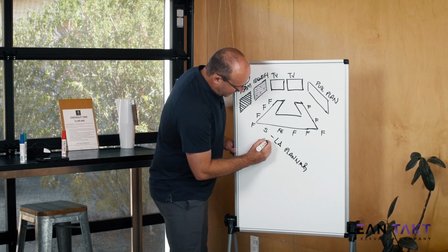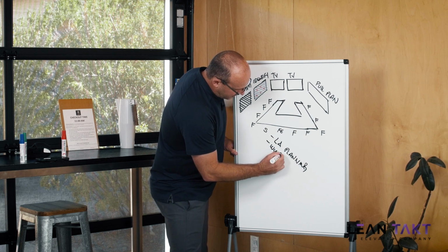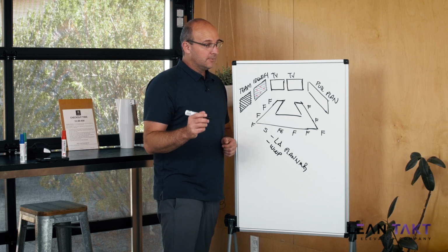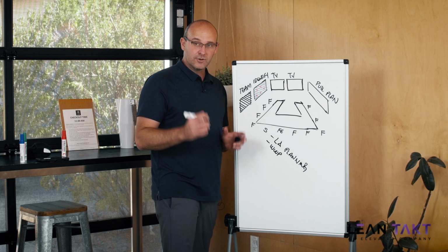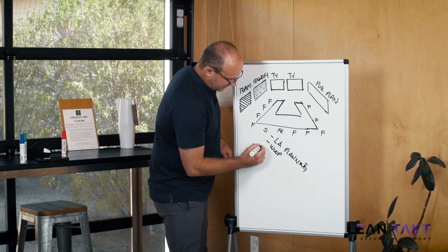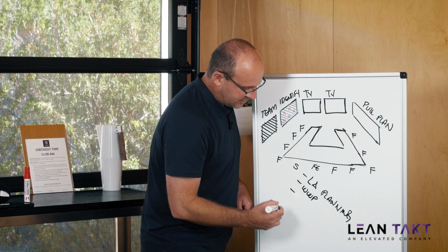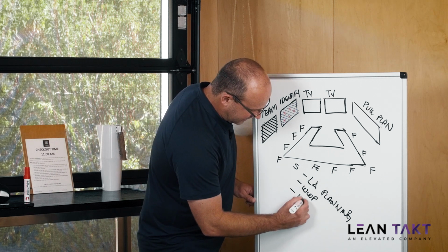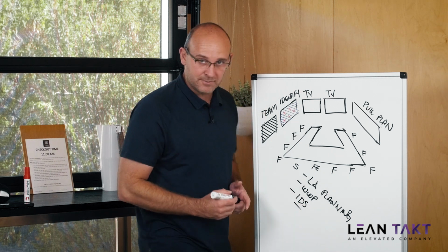Then you create a weekly work plan, not from whole cloth like most of the lean industry does, but from the norm level takt plan as a filter, and then adjust it from there for both of these. And then you can actually do any other problem solving. I would say then you IDS. Those are the main purposes of the meeting.